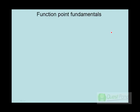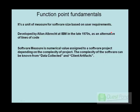The first thing is fundamentals. Function point is nothing but a unit of measure for software size. When we say unit of measure, it means it allocates some points — for example, centimeter is a unit of measure. You can grade tasks: a simple task is 1, a medium task is 2, and a tough task is 3. In the same way, when you say that something is 100 or 1000 function points, it is a measure assigned to a software size, based on user requirements.